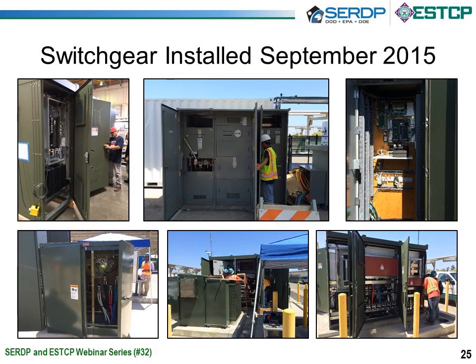Another aspect of this: when we went through the initial design phase of the program, because we were modifying existing infrastructure, one of the trades that we understood is that the switchgear that was part of the existing infrastructure needed to be updated. They had about 230 kilowatts of PV already attached to the existing switchgear at the base, but because we're adding the energy storage unit to the same switchgear with a common point of common coupling, we needed to update the AC bus on it because the existing one couldn't handle the increased current if both sources were generating power. So therefore, we had to go out and design a new set of switchgear.